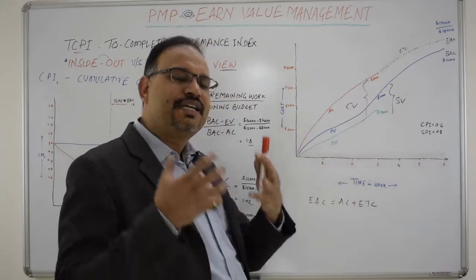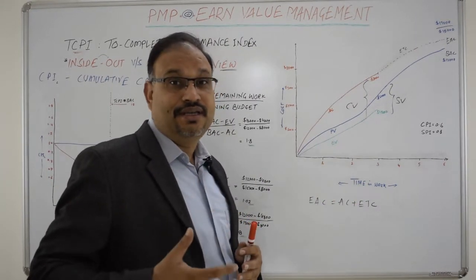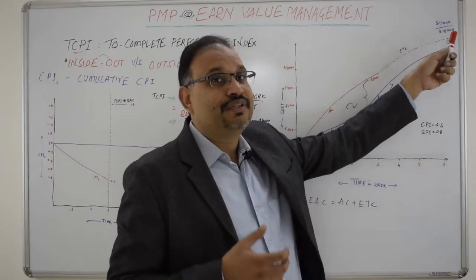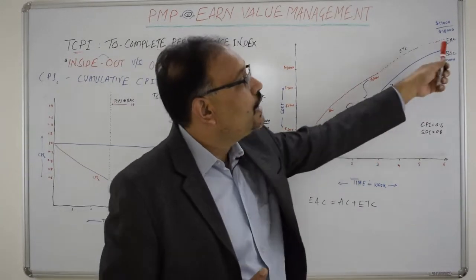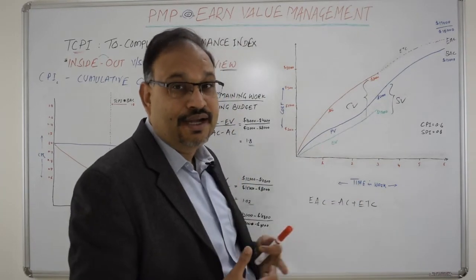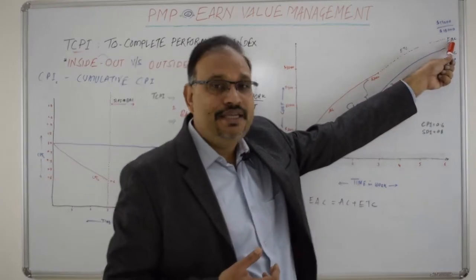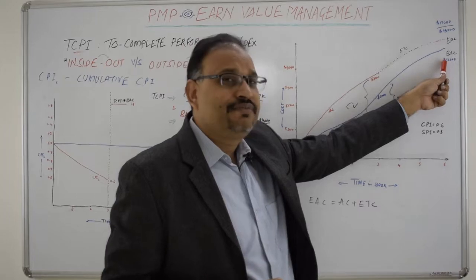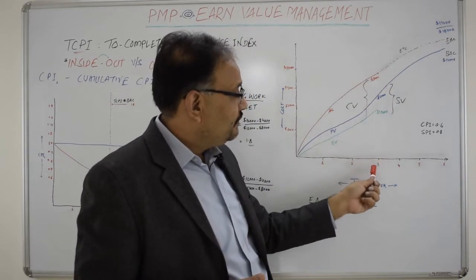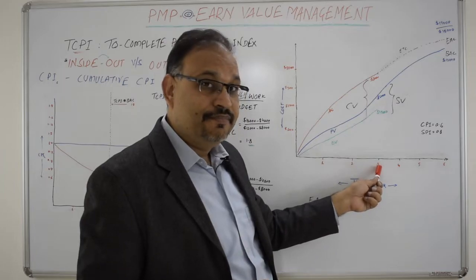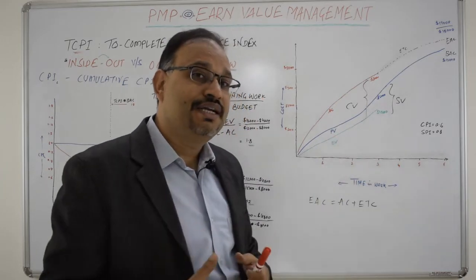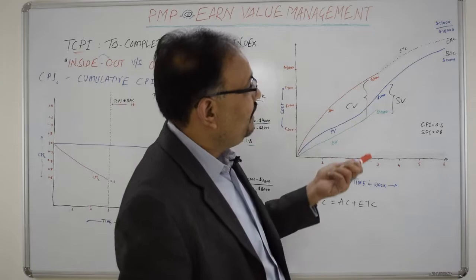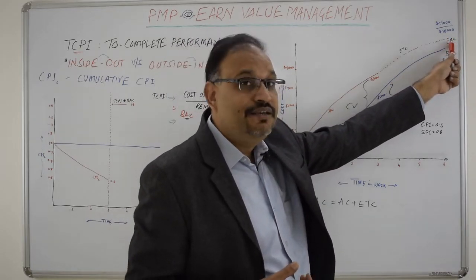At the end of week three, the project can use forecasting methods based on assumptions and scenarios to figure out the likely Estimate at Completion (EAC) budget. This gives an inside-out view — knowing the trade-offs internally, and projecting the EAC outward. Alternatively, the project may decide to catch up with the original BAC regardless of the current CPI, and for the remaining duration understand the desired cost performance level needed to meet that target.